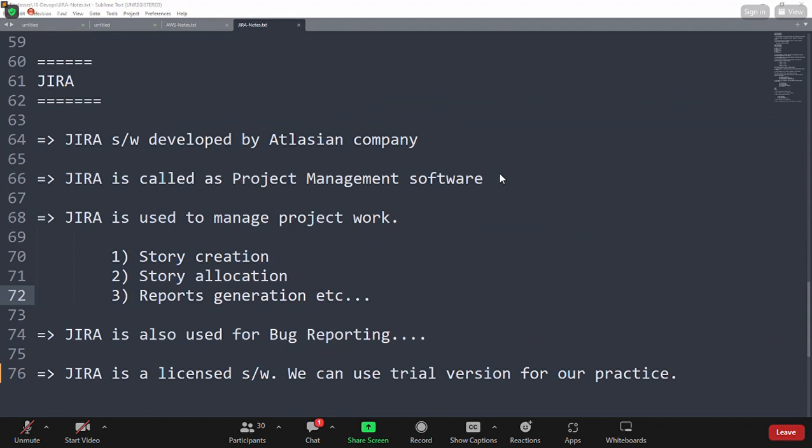You got my point? If any backlog task is pending after the sprint is completed, which means the 2 weeks, how do we drag it into another sprint? Once the sprint is started, you can't change that, sir. If any backlog is there, it will go to the next sprint. Once the sprint is started, you can't remove a story or add a story to the sprint. It is not allowed. We do carry over, meaning the pending tasks will be carried forward to the next sprint. For example, in this sprint we planned 20 stories, but only 18 were completed. Unexpectedly, one person has taken leave. So the 2 pending stories will be carried forward to the next sprint.